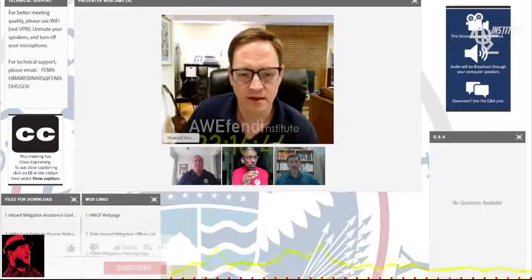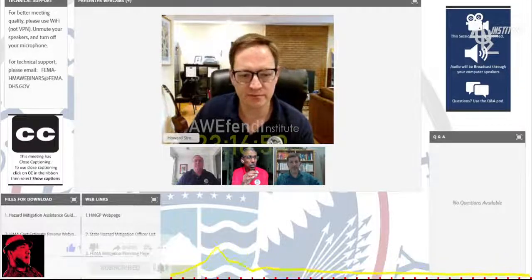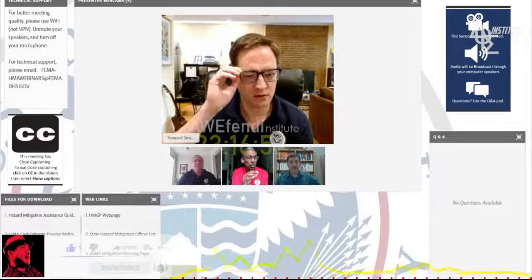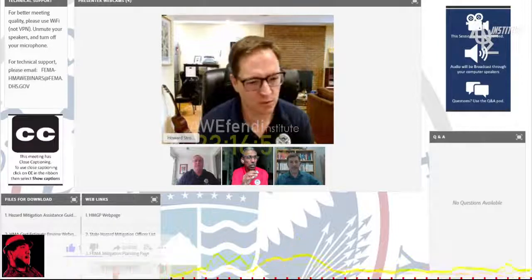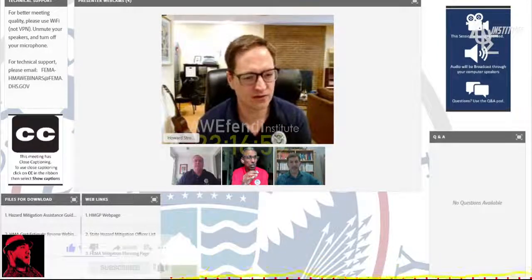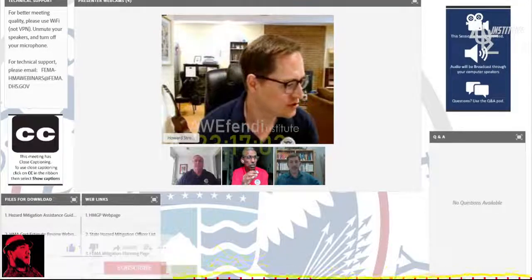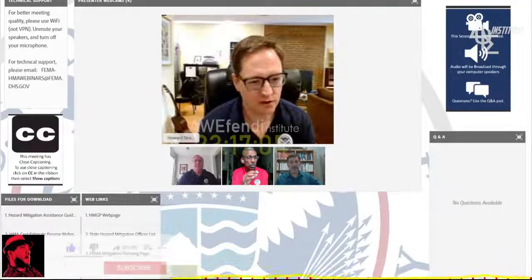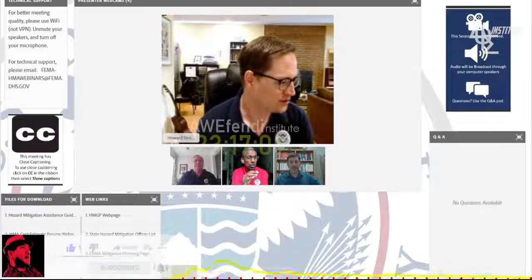Thanks, Sam. And I think as Brian was mentioning earlier, you can look at historic costs for similar work. You can look at costs from other localities, maybe near your jurisdiction, for similar work as guides to whether or not the costs you're getting from vendors or contractors are reasonable.